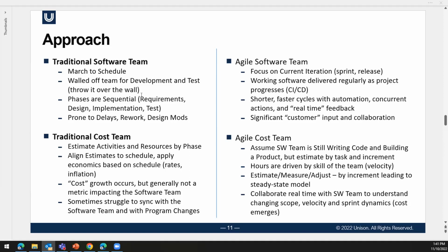I just wanted to comment, most of the Agile teams I've worked with, we do the measurement on the release, not on the sprint. It tends to get too burdensome to do it on the sprint basis. Plus, there's usually a planning cycle for the release, which mitigates a lot of these issues that Carol's bringing up. Thank you, David. I appreciate that.